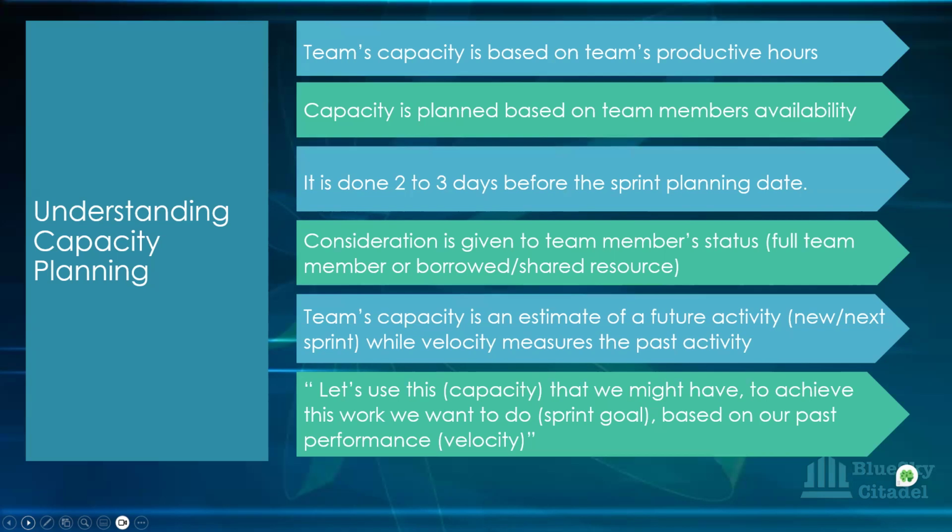Okay, so you have, in sprint one, full team. And when we finished working, our velocity is saying, oh, we're at 100. And then we're going into the next sprint, we're having a half team member working. Definitely, you're not going to work with 100 velocity. So your capacity determines the velocity. So you have a baseline velocity that will tell you, oh, for what you're doing, your average velocity is 100,